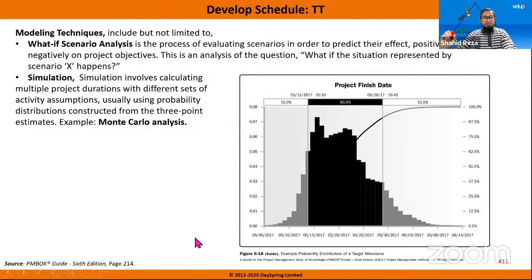But is it going to have an impact on my critical path then? Yes. If the task is on the critical path, then the project schedule will be changed. So it can push the critical path and also push the project schedule. If it happens that it is changing the critical path, then you need to talk with your stakeholders, with your sponsors. Then we will discuss crashing and fast tracking, where we can.